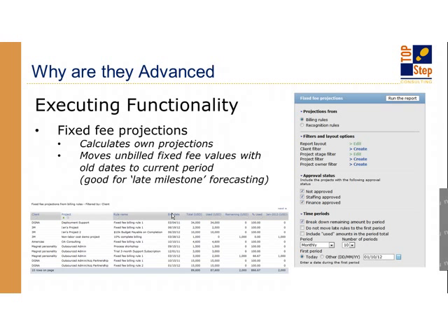So you can see where it should have been billed based on the end date, but where it hasn't been billed and you want to move it to the current period, you can see that. So it's good for your milestone forecasting and also for understanding where you need to update milestones on projects. If you run your billing for the month and then run this report and see where your late milestones are, then you can target those to be updated.